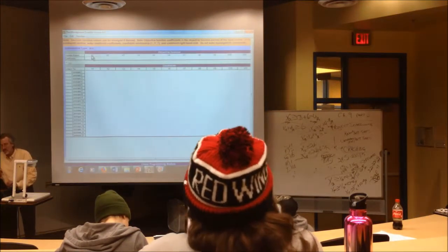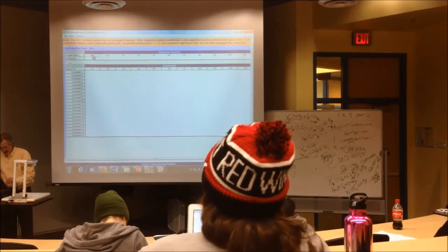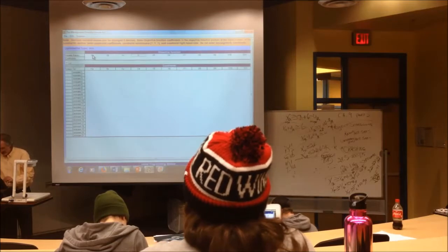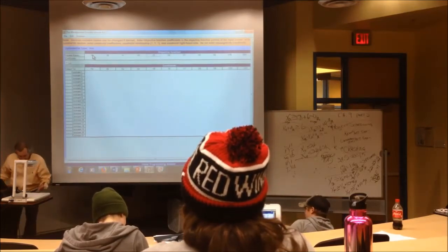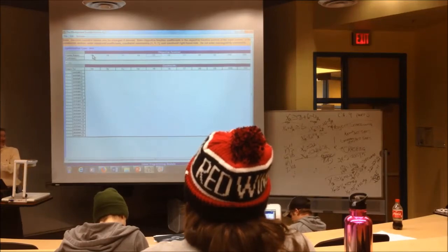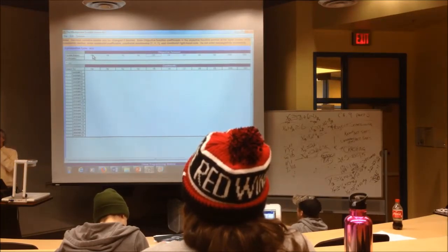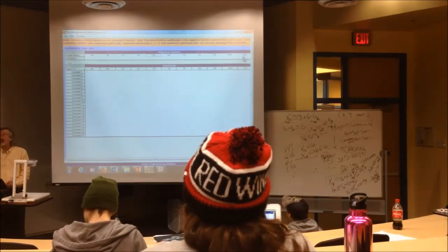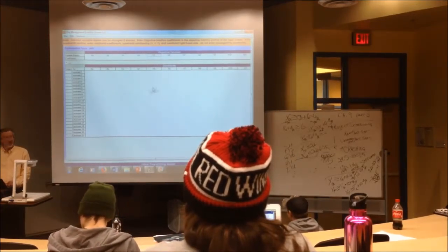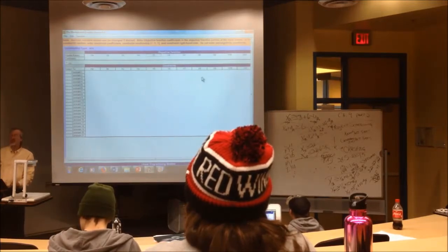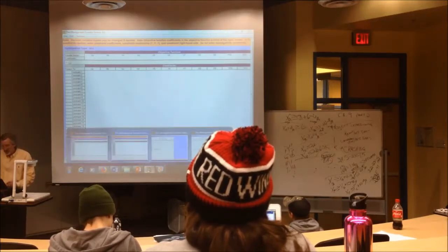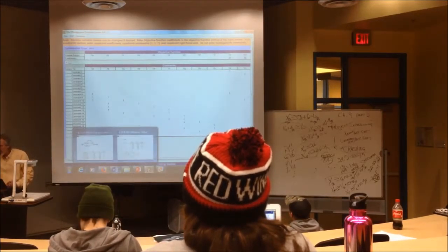Look at these. Then I start making them. This is x sub A, x sub B, x sub C, x sub D, and then go all the way to I. And then I go y sub A, y sub B, y sub C. Now look at the objective function. You would have no numbers underneath these x's in the objective function. All your numbers would be way down here where the y's are. And then down here you have all your constraints. Some of them have nothing but blanks across here, maybe just a 1 here and a 1 there. And you fill it all in, and it looks like this.